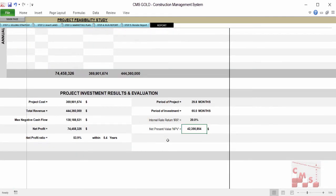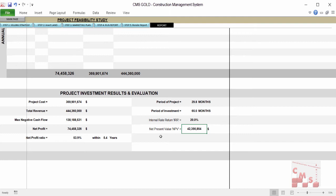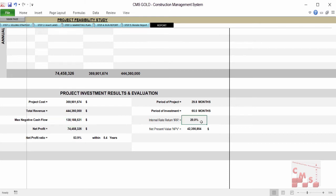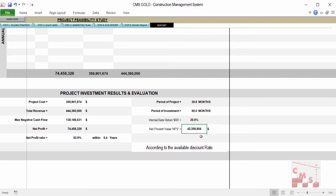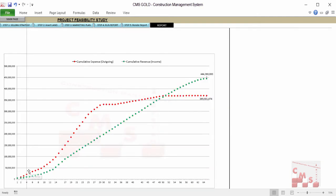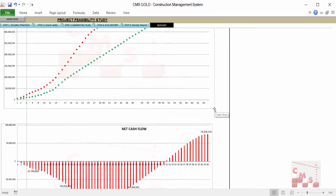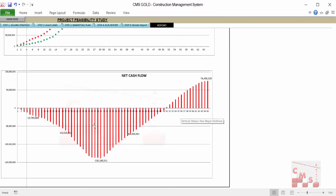CMS will give you a final report with the acceptance criteria for project evaluation: the required maximum cash flow, the net profit, the internal rate of return — and considering the time value of money, the net present value, because $1,000 this year is not equal to $1,000 after five years. CMS considers this and gives you the final evaluation plus diagrams showing the relation between cumulative expenses and cumulative revenue during the project lifecycle, plus the net cash flow required for your project every month.